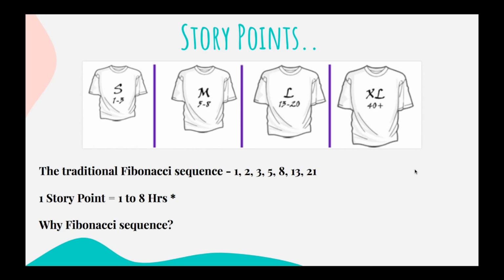For our understanding, it would be in t-shirt sizes: small, medium, large, XL. 1 to 3 points is considered small, 5 to 8 points is a medium size story, 13 to 20 points is the large size, and anything more than that is all considered XL.